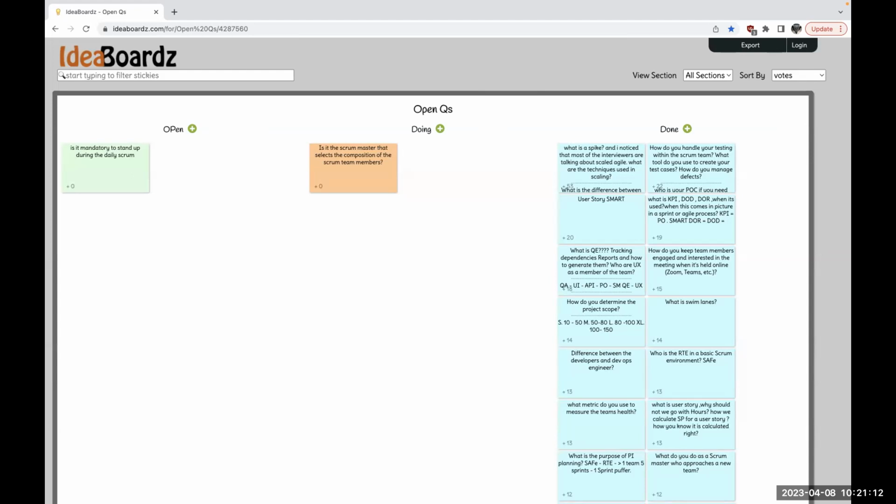When I say the maturity of the team, I'm going to tell them, gauge your team from 0 to 5. How agile are they? How self-dependent are they? How cross-functional are they? How flexible are they? Are they stable in delivery? How responsive to change, how transparent are they, what is the level of their dashboard. If they really ask, you're going to say, give me a high-level understanding of how self-functioning this team is from 0 to 5.